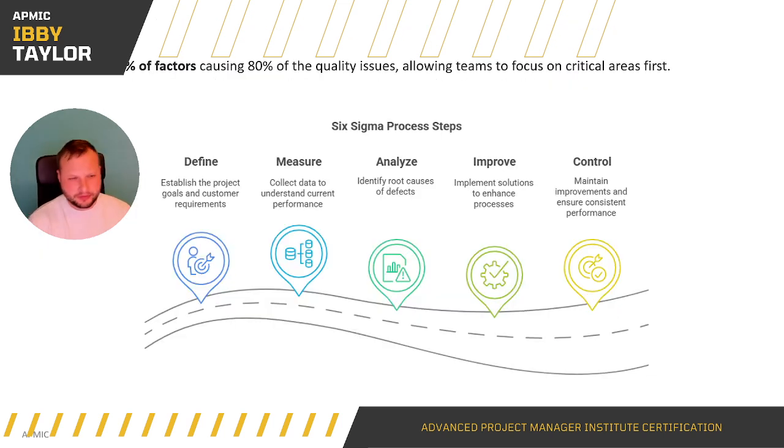And then Pareto analysis. It looks to identify the 20% of factors causing 80% of the issues. What this then does is allows you to focus resource. If you understand essentially what your big ticket items are, what can you put resource into which is going to solve the most problems?